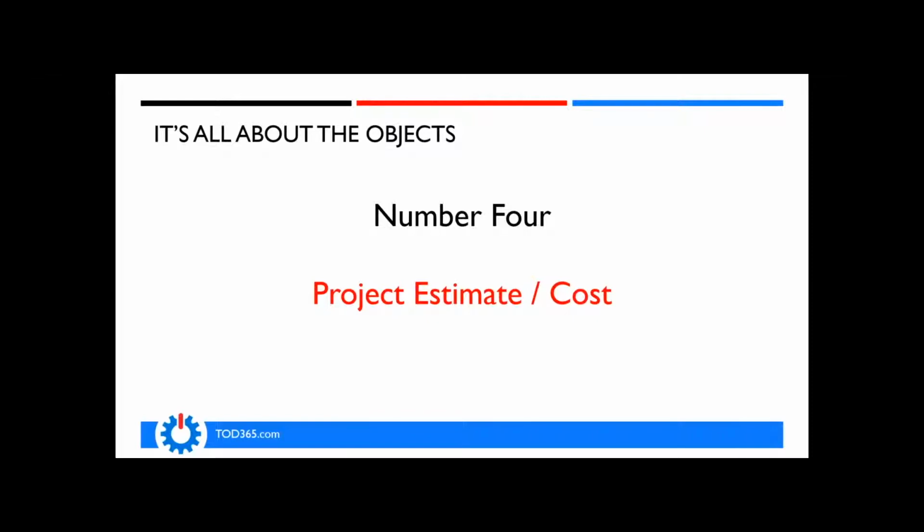And as you know, as we start going through the project and they start surfacing more and more things that they want to do, that 2 times number is easily going to go to 3 and 4 times, and we're doing a good job and the customer is happy with what we're doing. So the cost of these projects, I think, is going to overwhelm a lot of folks.